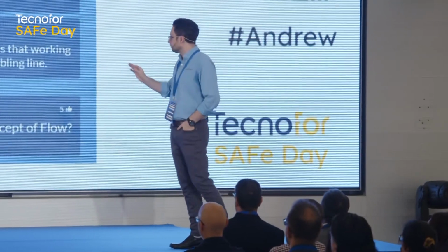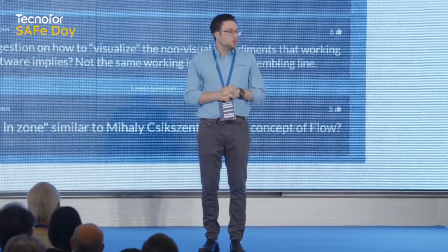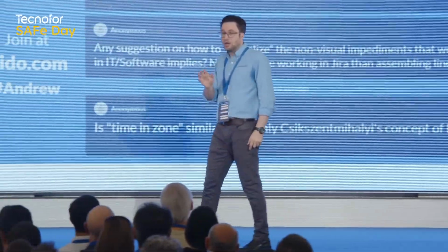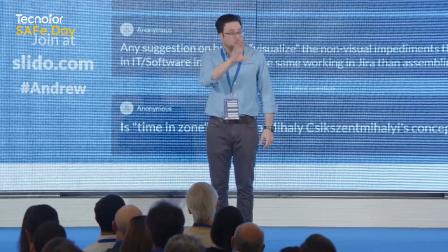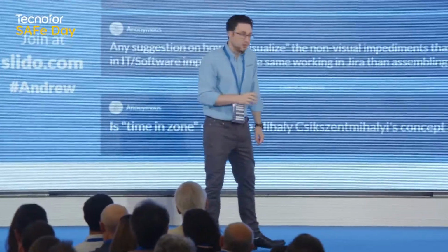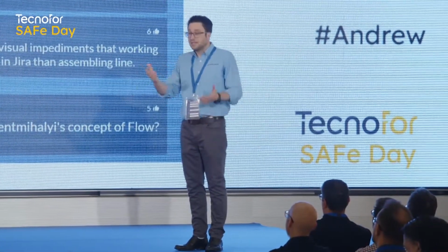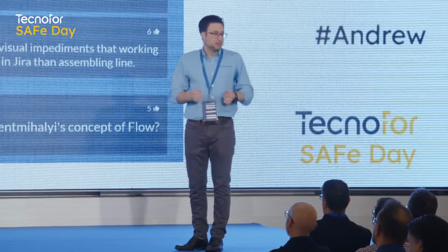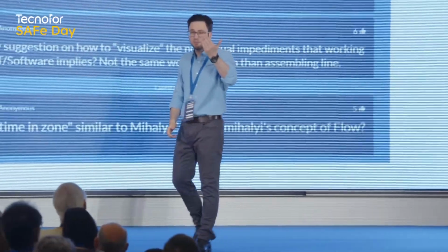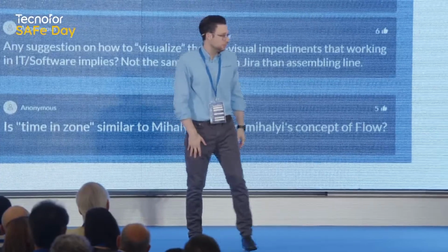Yeah, so this is really interesting. One of the things when we talk about the bottlenecks in the Flow Fundamental 2 is that we found that it's not always possible to surface bottlenecks through visualizing the system. One type of bottleneck in particular around skills specialization, either over-specialized or not access to specialization, is very difficult to surface through visualization. So there we need to use things like retrospective techniques, things like inspect and adapt, problem solving, getting the team to surface the qualitative feedback and problems that they're having, not relying just on the visualization of the system. So Flow Fundamental 2, we recommend using the system to visualize the bottlenecks, but also using retrospective techniques to make sure we surface them through those means as well.